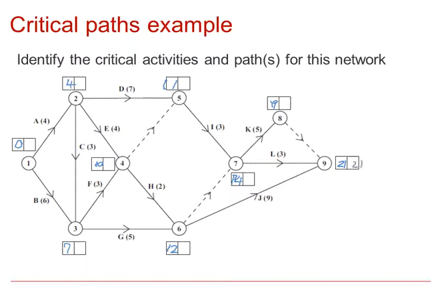Moving backwards now, I start with 21, sorry the box is a little small, and find then that this has to be finished by 21. That 21 take 5 will mean a 16 rather than 18 in that box. The 18 you might have thought from the 21 minus 3 when we're taking the smallest numbers on the way back.